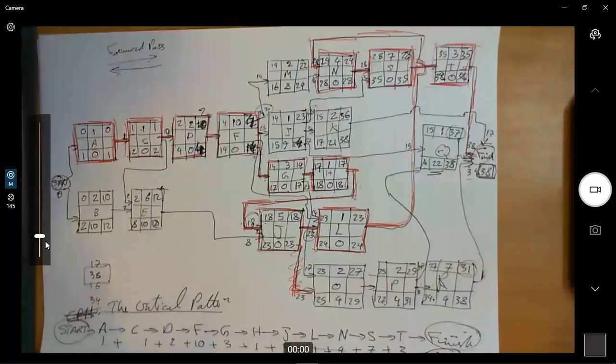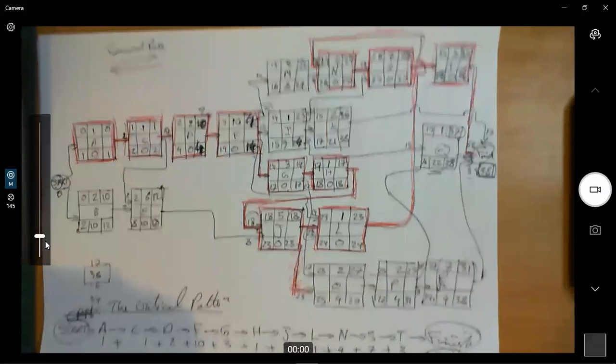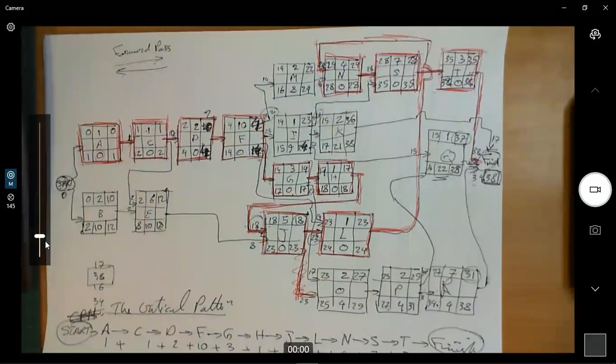What do we mean by critical activities in a project? What is the meaning of a critical activity? It means we cannot change it, and there is no flexibility in changing it. If we make any change in the critical activity, what happens to the project duration? The project duration will increase. If there is any delay in one of the critical activities, the entire project duration will increase. Okay? Clear, guys? Clear, Doctor. Okay, so this is our example.